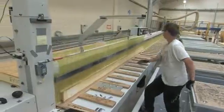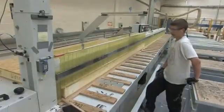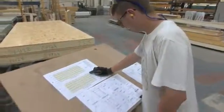Well, the challenge at St Pancras really revolved around a number of elements. U-value was very exacting. Air tightness again was important. Speed of build and the lack of ability to use traditional access equipment such as scaffold up the outside of the building, but probably more so than anything the stringent fire requirements that were set out by Galliford Try and in turn the project insurers meant that our product amongst all the products that were evaluated was the one that pretty much ticked all of the boxes.